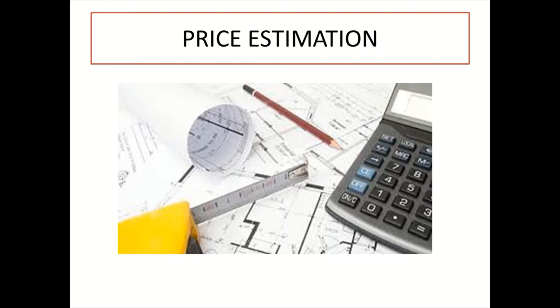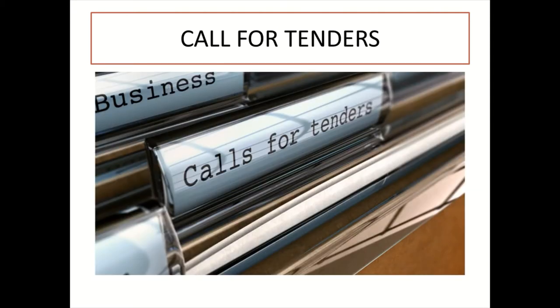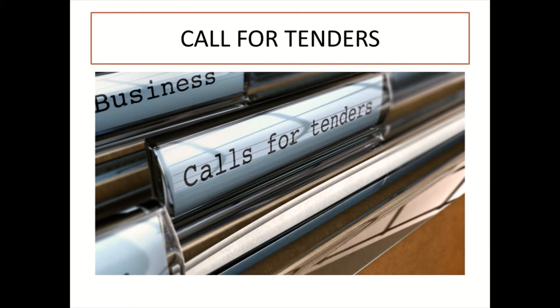Now after attending a site briefing and getting information about the project and what it entails, interested contractors will purchase the tender documents, come up with their bid price, and return all the documents to the client, architect, or quantity surveyor for consideration.